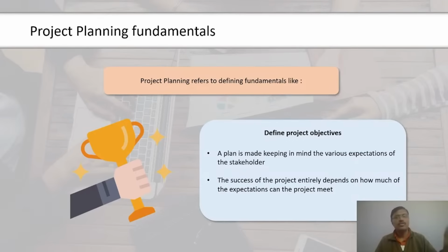Once the estimate of each of the activities is arrived at, the next project cost management process is to determine budget. It is the process of aggregating the estimated cost of individual activities or work packages to establish an authorized cost baseline. This is where the control account concept comes into the picture. The estimated costs of the activities are aggregated to arrive at the cost budget at the control account level.